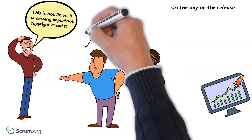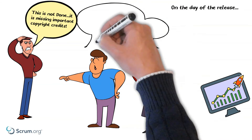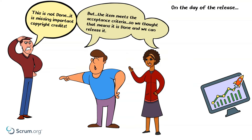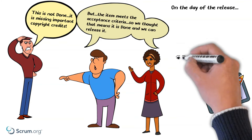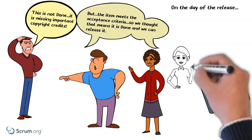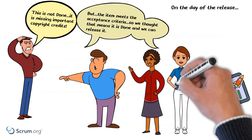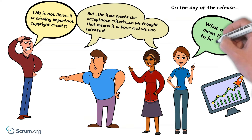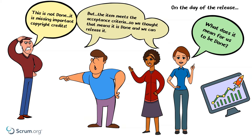Steve asks why Blake and Nisha moved the product backlog item to done, when it is obvious to him that it cannot be released in its current state. Blake and Nisha, on the other hand, thought it was releasable — after all, they met all the acceptance criteria, so they consider it done. The team has different views of what it means to be done. Robin, the scrum master, points out that the scrum team needs a definition of done.